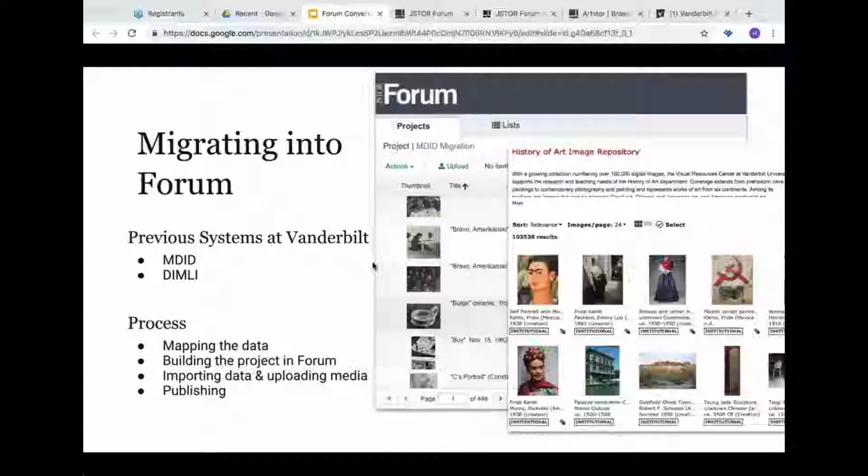So we start with the mapping, and usually I also build in what we call user acceptance testing, or UAT. It's the review step for every phase where the institution checks the work, gives any feedback, applies any changes, and then when that part of the phase is reached, we know we're moving on to phase two, and we're transitioning our sites to the next portion.